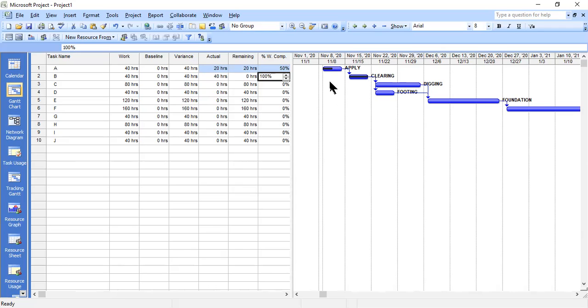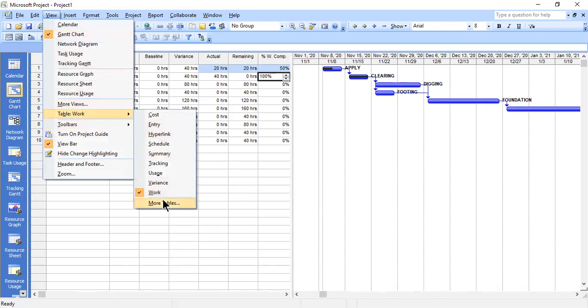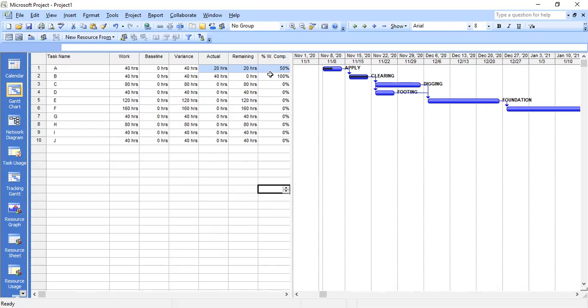So as the project manager, you can come to this entry, you go to view, go to table, then focus on work. Then you can manage work to show that I've done 100%, this is covered, this is 50%, this one I've done about 40%, or this one we have done 60%. Then it will be showing on the diagram here, and 60% means what? You have done 24 hours on the actual estimated period. So you're remaining 16 hours to complete everything.